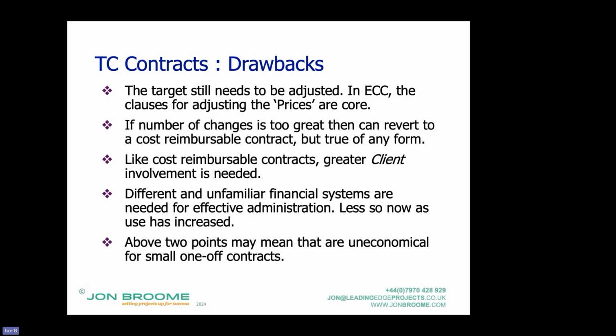If the client isn't there to cooperate, doesn't have the capability, or the project just doesn't have the potential, the risk within the prices to cooperate to manage out threat, managing risk, then arguably the gain share which the client takes is just lost profit to the contractor. And as a result, they just have higher prices than on design and build, because it goes back to that asymmetric risk bit. So, particularly if it's based on collaboration, you do need client involvement to be there.